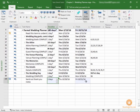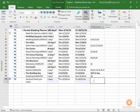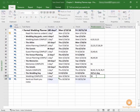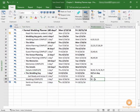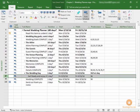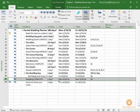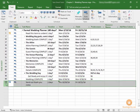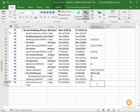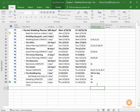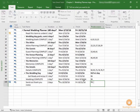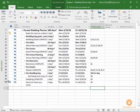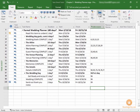The start is 10-20, the end is October 21st. Predecessors: a predecessor is what tasks must occur first before this task can occur, and you simply enter the line item number here. For example, the wedding complete has a predecessor of 98. 98 is get ready and enjoy the wedding day, and the wedding is not complete until after the wedding day actually occurs. So for task number 100, we want the predecessor to be task number 99. You can add other predecessors by simply adding a comma and entering another number. This is adding a new task by selecting the insert task option.